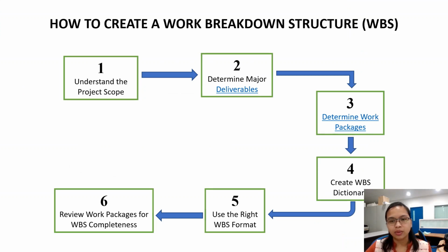Fourth, we must create a WBS dictionary. A WBS dictionary outlines the definition and scope of each element of the WBS. Fifth, we must use the right format of WBS, because by using the right format, it will help us to create the text-based hierarchical grouping.